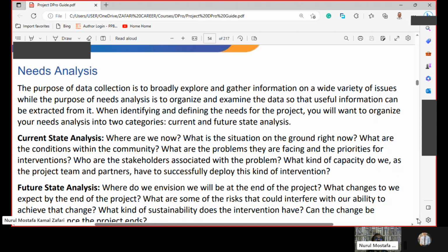normative needs, comparative needs. Felt needs, which is dreamed or thought by the beneficiaries, but they don't or can't offer a solution. Expressed needs, expressed by the beneficiaries, and it can be learned by observation by the researchers or the project team. Normative needs, the comment of experts, specialists, and professionals. Comparative needs, comparing one situation with another situation.